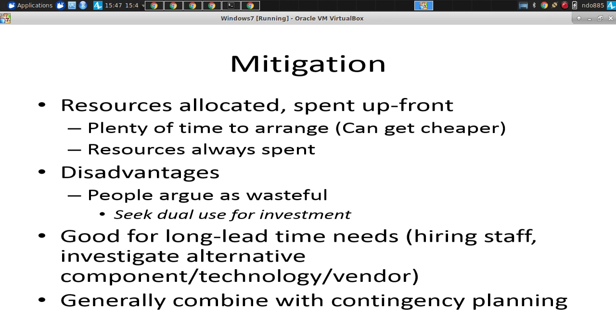But we put in place a contingency plan in our contract. It was a contingent contract. We had various possibilities. And one of the possibilities was, in the event that the project is canceled by the client, they would have to pay us close to $100,000, which is about $80,000. And lo and behold, a lot of the way through the project, maybe two-thirds of the way, the president suddenly changed. I think the board deposed the old president, a new president was put in.